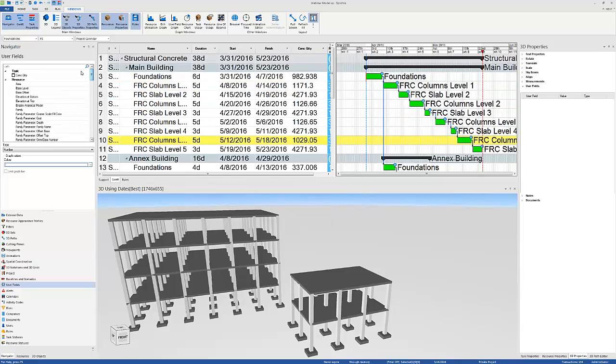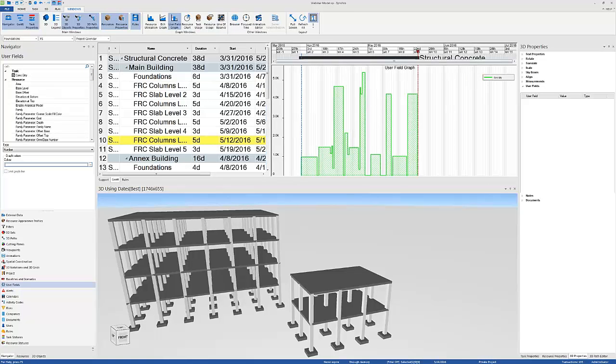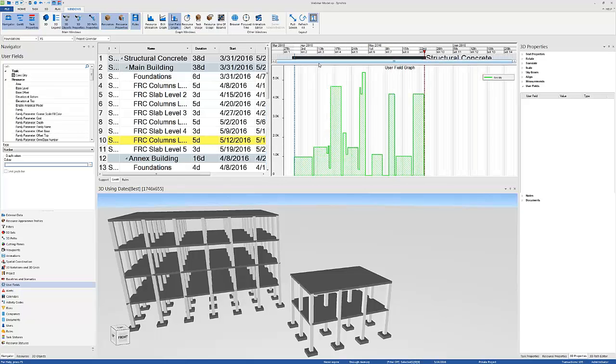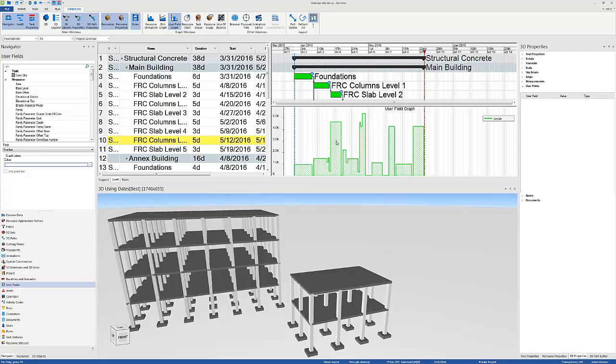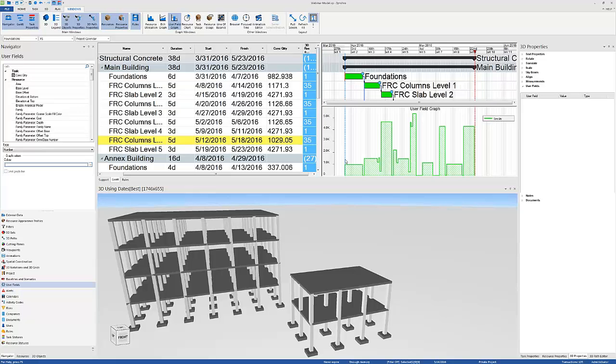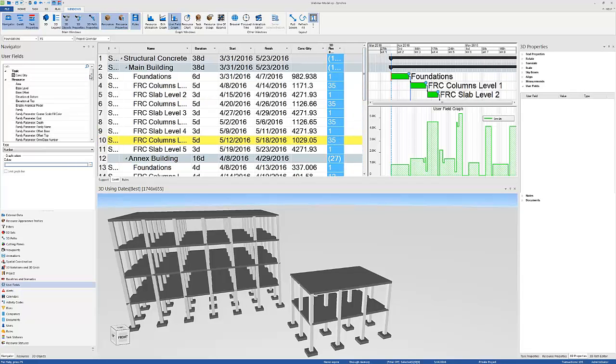Now, just by doing that, I can plot this graph right here and go to user field graphs and see this user field graph that will show how the concrete quantities will be brought on site. But this is not the daily concrete quantities, because if you look more closely, these are the quantities for the entire task, and each task spans more than one day. So we'll have to do a small adjustment, and I'm going to use this to demonstrate a second feature, which is how compatible Synchro is with Excel.